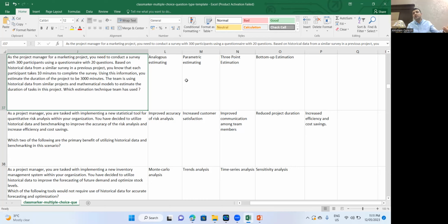So you estimate that based on the amount of work he did yesterday. Now today there are two trucks, so he is going to take 2 days to finish it, right? So you just multiply it by two. So y is a function of x, right? The more the scope increases, the more time is needed.